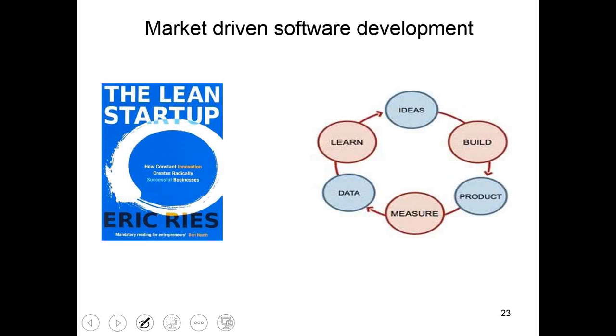So in all these three scenarios, the common characteristic that you could see is the nature of the demand. In all these three, it is pretty difficult for you to determine clearly what is going to be the demand. In the case of application support and maintenance, if you pick up 2 features and start working on them, there might be a production issue that comes later, which will get a higher priority compared to what is already there in your bucket. So demand is always determined by events that are happening outside your control.